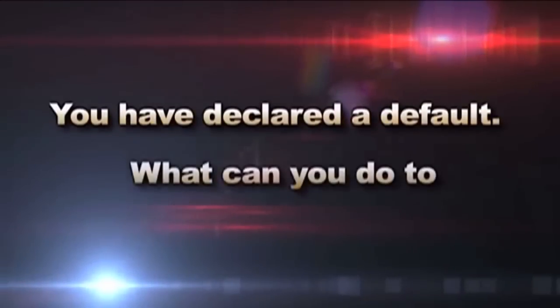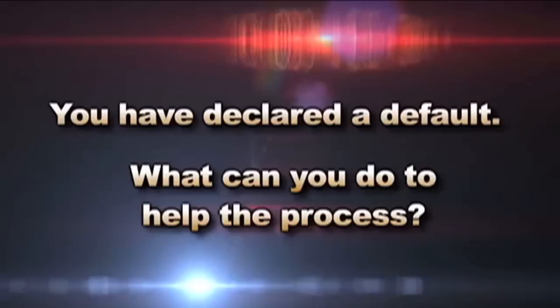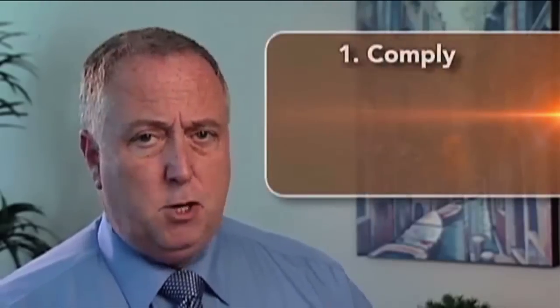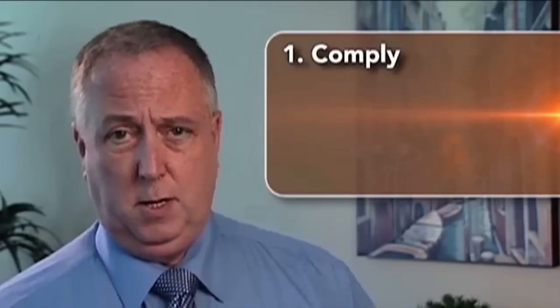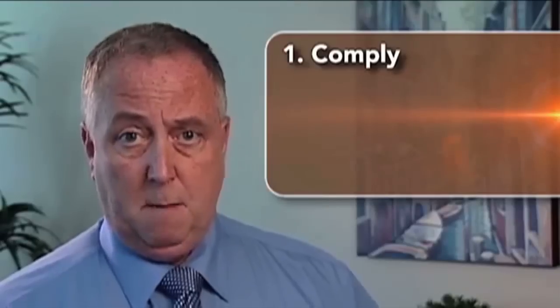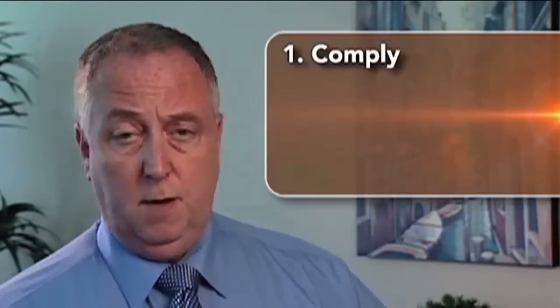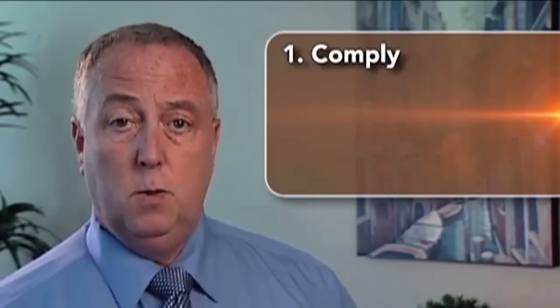Once the contractor has been declared in default and the surety has responded under the bond, there are four things you can do to expedite the default resolution process. First, make sure you comply with the contract terms and the bond terms — this is critically important because without that, you may not have any protection under the bond. Make sure you've paid the contractor in accordance with the contract and given both the contractor and the bonding company proper notice of any issues as required.